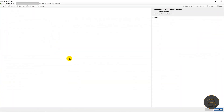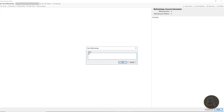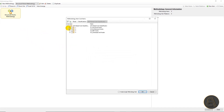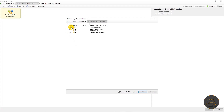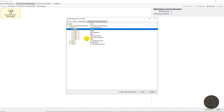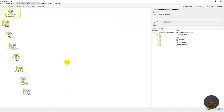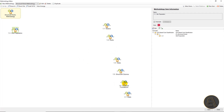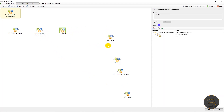Now we're ready to create our methodology. We'll go to the schedule tab and click on the methodology icon. Since we don't have time to create methodology for all construction works, we will focus only on structural works. We'll create a new methodology and name it 'structural works methodology'. Similar to zone creation, we right-click on the blank area, choose new item and then linked. Our previously created classification is automatically selected as reference to this methodology. From the cost classification we will check only tasks for structural works and click OK. All selected methodology items now need to be arranged in a logical construction sequence: site preparation first, then structural foundations, then beams, slabs, and columns and walls. Roofs are last.